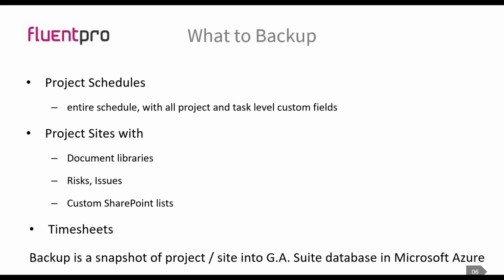protected. So one of the features that not many people think about is the protection and backup of timesheets. Companies rely on the timesheet, and I will show one of the cases later of how the error was restored with our solution in timesheets. But backing up timesheets, just a point of reference, it's also critical because timesheets are used to make many business decisions about the progress, about the costs, about forecasting, about the plan. So it's also a critical piece of information, and G Suite supports it.